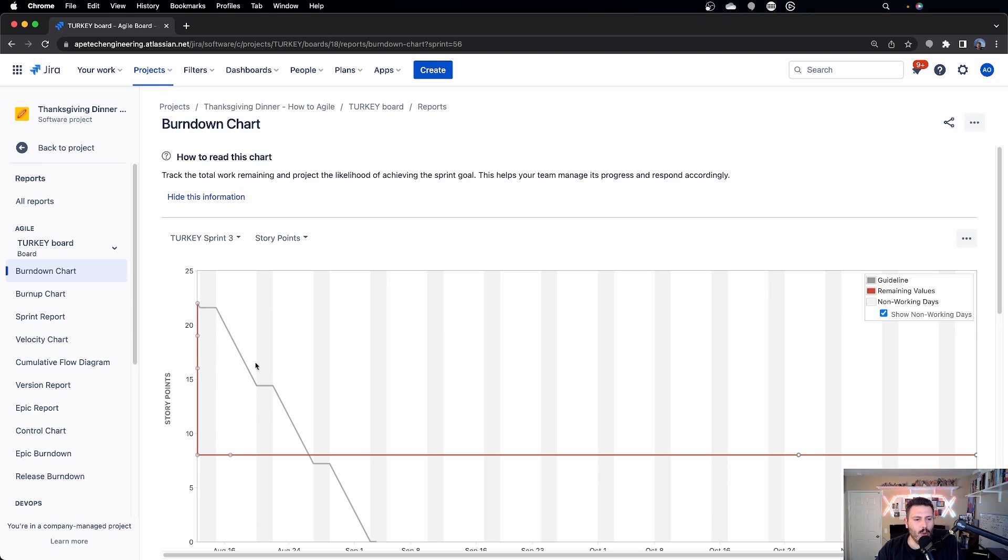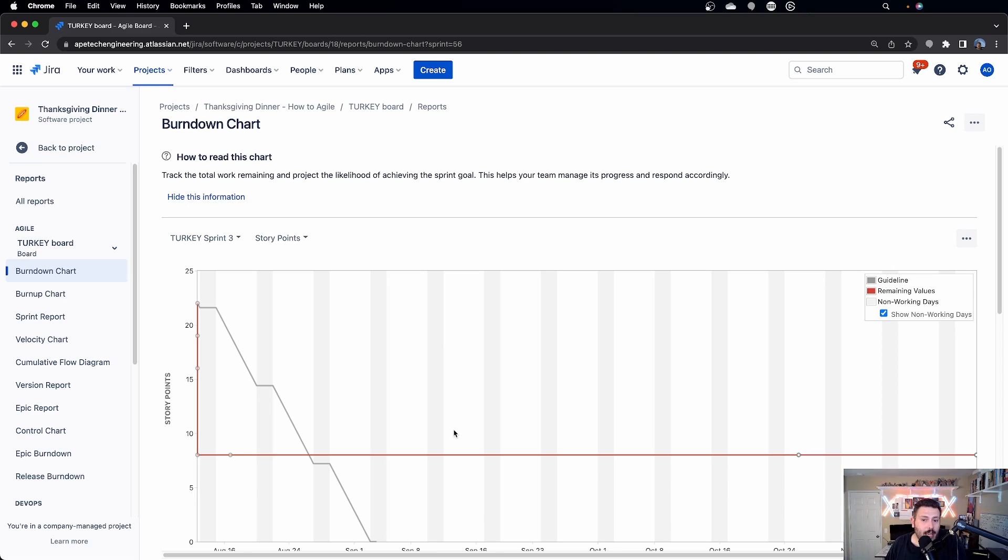And so you want to encourage your developers that as they're actually using Jira and they're doing their work, that they're actually closing out their stuff. They're making it move all the way to the right so that you get the credit. Now where this can be problematic is if your team has a process where your product owner has to review everything before you move it to done, or maybe you have to go through QA or UAT, this can introduce all kinds of nightmares because you're basically artificially creating these flat lines in your process, which kind of defeat the whole purpose of Scrum. In general, you should modify your process so that it does follow the line a little bit better. If you're waiting for that product owner to review and they're waiting until the end of the sprint, you can accelerate that. You can pull that into the left and have your product owner review on demand as stories are closed. If you have your QA process in their bottleneck, maybe you kick them out, or maybe you accelerate them and tell them, get their gear in action here so that you can completely close things up as they're being closed.